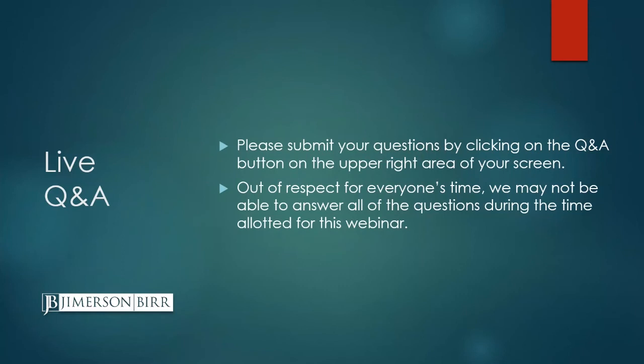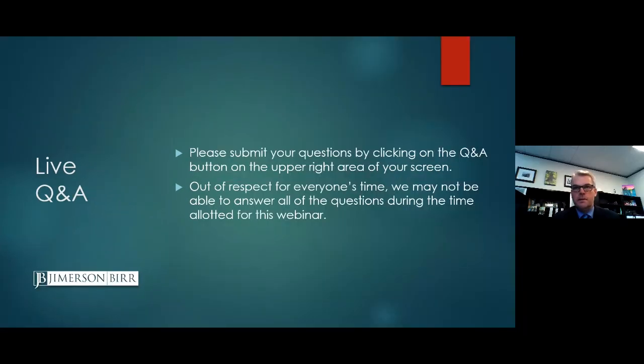Great, thank you, Ryan. Another one is, do you recommend pre-suit mediation? I'll take that, Elizabeth. It depends on the type of case that it is. If the dollars at stake and the issues involved are ones that are involving a lot of dollars and a lot of complex issues, I would say that pre-suit mediation has not, in my experience, been productive. Some contracts have a pre-suit mediation requirement in it, and I think that works well for smaller matters, discrete issues that shouldn't be in litigation, that parties can potentially resolve without involving experts and doing a lot of discovery.